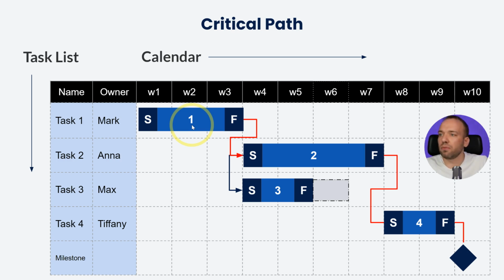So for example, if you look here on the screen, you have task 1 and task 2, which are currently finish to start, sequential. If you want to compress the red line, instead of completing for this number of weeks, but faster, you can challenge your critical path. Of course, you need to know it first, but assuming that you know what critical path is, you will review your critical activities and say, okay, so activity 1, 2, and 4 are my critical activities. If I fast track or crash some of them, I can finish earlier.